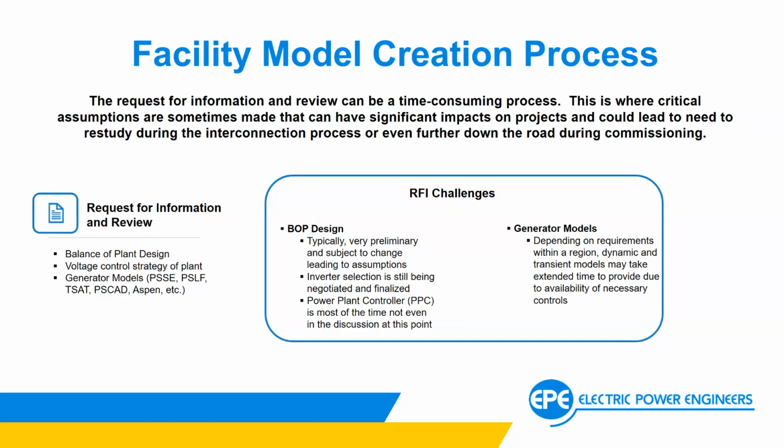So this is where typical assumptions can come in. We can use a generic plant controller that does your typical AVR, PFR, et cetera. But the idea with that is that communication needs to be had with the respective developer to let them know that if this changes at any point in time and more complex controls come in, that's going to lead to changes in models, changes in studies potentially, and potentially affect the dynamic response for AVR, PFR, and such at the plant level controls. And again, these are things that we've seen come up as of late.